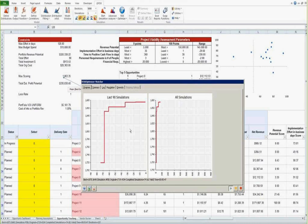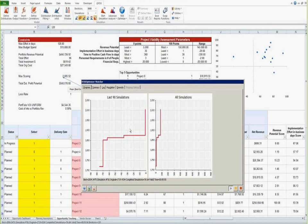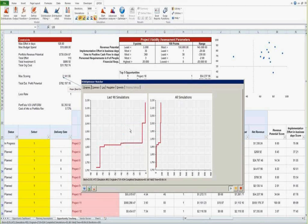So given the relative level of uncertainty, we picked that one, because we could have used, again in three points, a beta pert, which is a much smoother bell-shaped distribution, which has lower standard deviation, which inherently is less risky. So if you were picking one of these distributions, if you had no knowledge and felt very uncertain, you'd take a uniform. If you feel you can bound your problem with a min, max, and a most likely, but you still feel kind of uncertain, you go with a triangular. And if you feel pretty confident about that three-point distribution, you can use a beta pert.